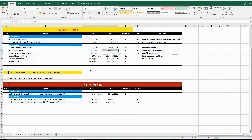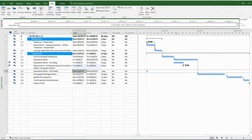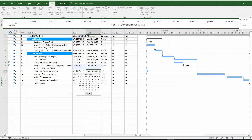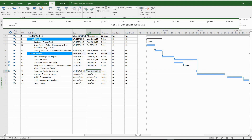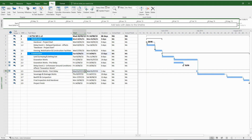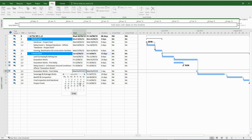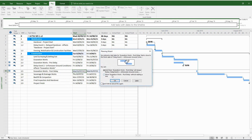Now we need to enter the date for the last activity in the Fragnet, which is ExcavationWorks post-delay. While entering the finish date for this activity, MS Project will give us two options for the start date. Please make sure to choose the first one, which is 'keep the constraint' — we'll adjust the constraints later. The start date has to be the 22nd because the 19th of June 2015 is a Friday, so we have to take into account the weekend.